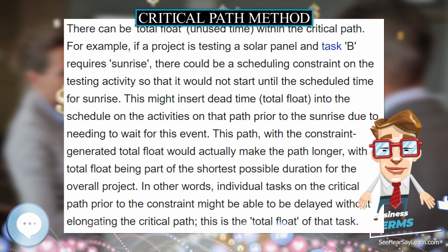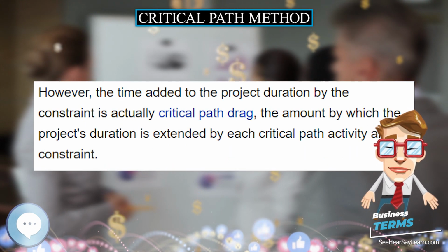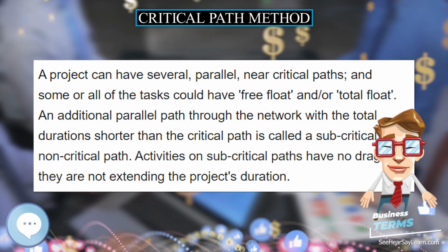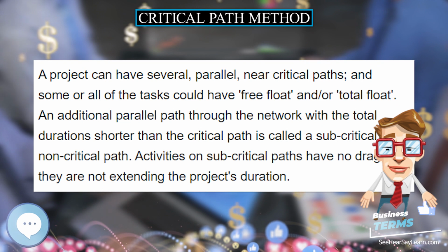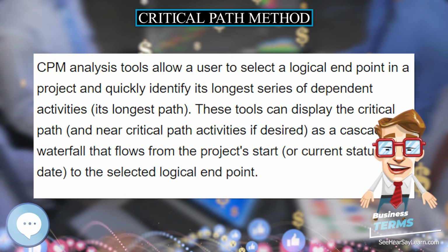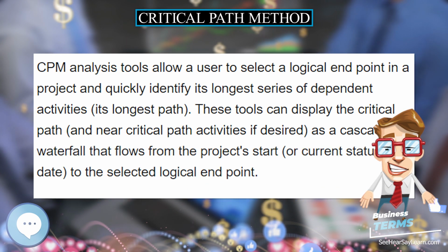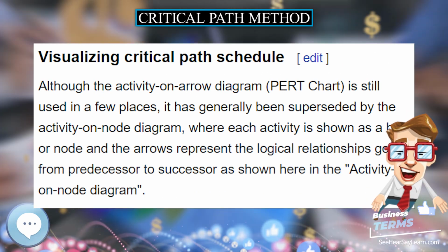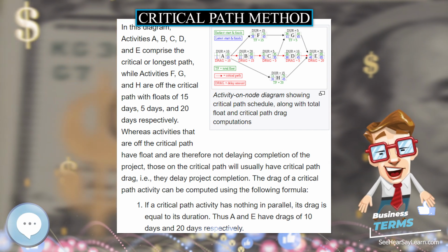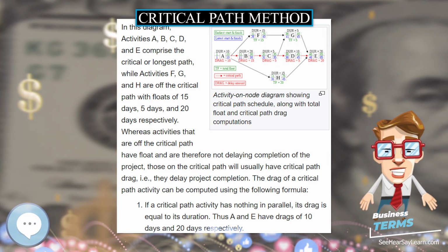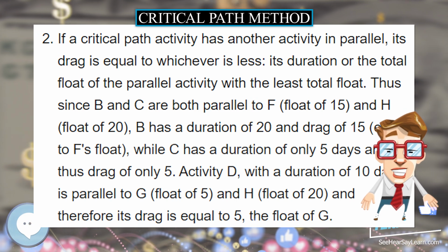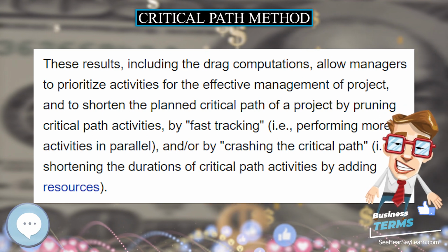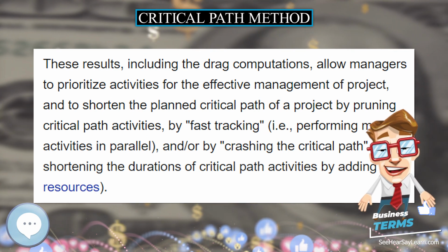Flexibility. A schedule generated using the critical path techniques often is not realized precisely, as estimations are used to calculate times. If one mistake is made, the results of the analysis may change. This could cause an upset in the implementation of a project if the estimates are blindly believed, and if changes are not addressed promptly. However, the structure of critical path analysis is such that the variance from the original schedule caused by any change can be measured, and its impact either ameliorated or adjusted for.